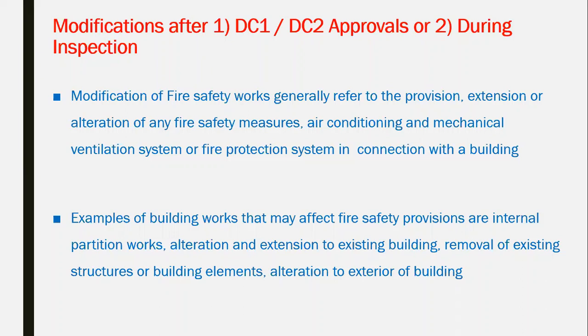Simple, if it is not modifying the civil defense requirements and the escape routing for the building, and not completely changing the architectural layout plans or the structure. This will be a simple one. The major one is if it is a big change for the architect and the project access for the buildings, the escape routing, the entrance. This will be a major modification.